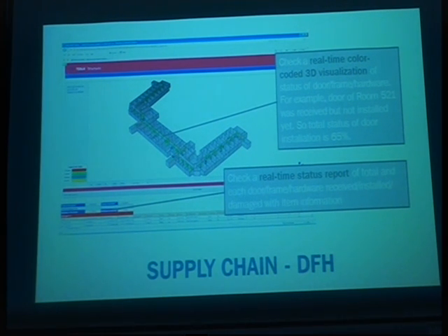Like I said, we do self-perform our own work; we install our own door frames and hardware. And so from a supply chain perspective, we're able to leverage Tekla to track where our doors and frames are, from the manufacturer to the time they get delivered to the job site, through the inspection process until they get installed. You can look at a BIM model and find out which doors are installed, which doors are defective, which doors are not installed, and get real-time information at your fingertips.